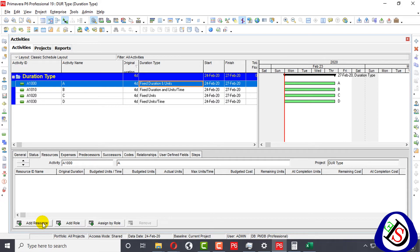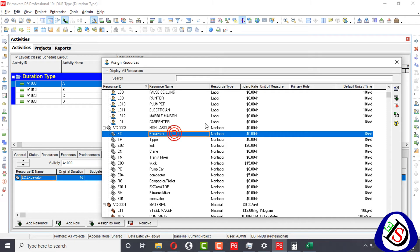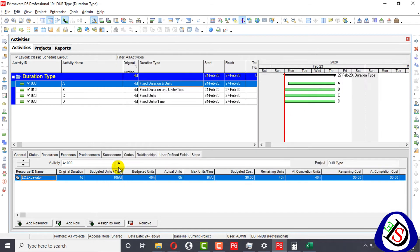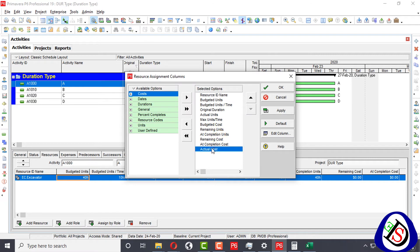I will go to Primavera P6 and add a resource — an excavator, which is non-labor and measured in hours. You can see budgeted units per time is 10 hours. Budgeted units per time can vary, while the fixed values are budgeted units and original duration. I will simplify the columns to show just the key ones.